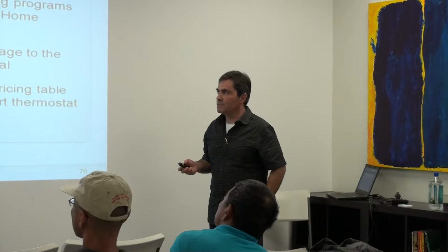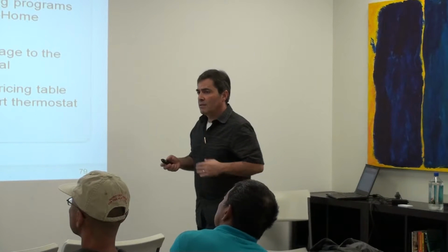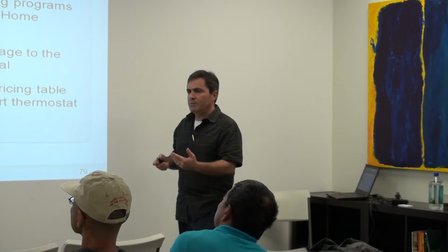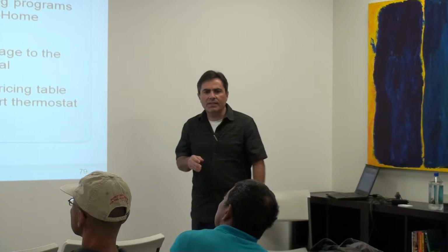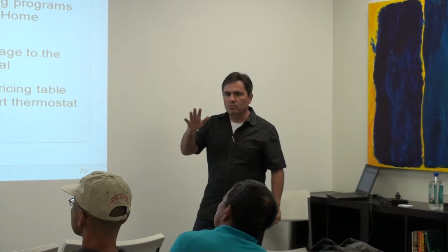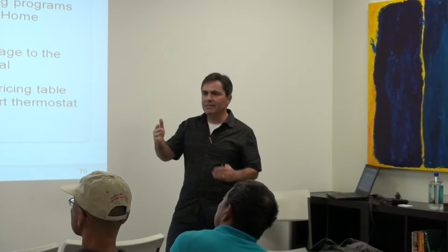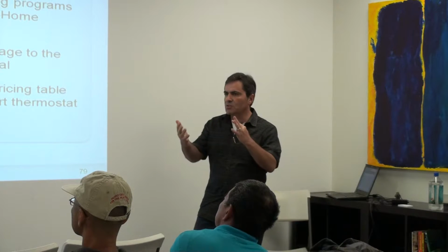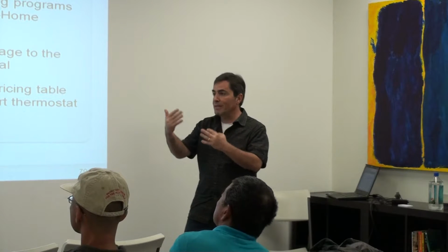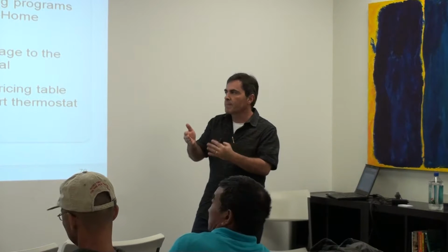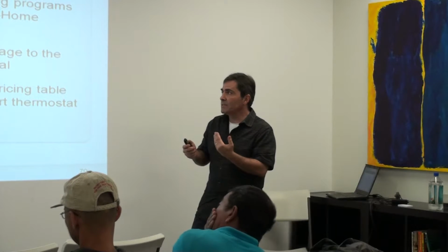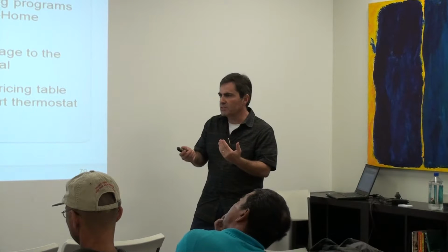So one way to do that is using workflow steps. Say, okay, in order to make a payment, I've got to go through these steps. First, I have to be able to say, how am I going to pay for it? So I need some kind of a UI for me to select the method of payment. And then I'm going to select my method of payment. And now I'm going to actually need to collect some information.